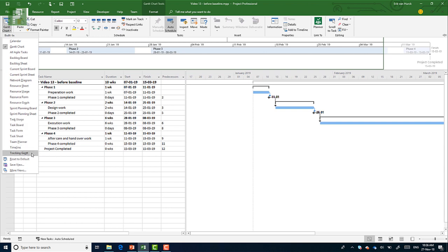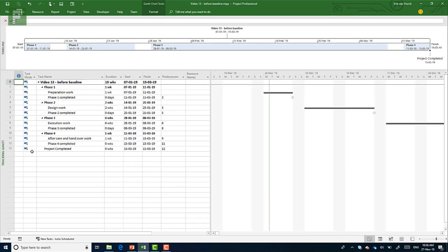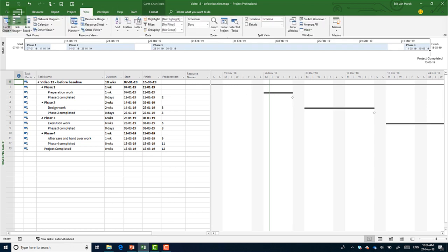It's down below in the Gantt chart drop down menu. If I click on tracking Gantt now, I will see these gray bars here. And these are the actual baseline schedule that you had.